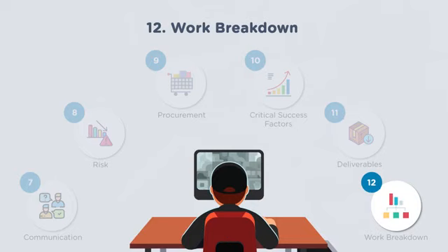I'm saying that a product will have multiple components involved. Those need to be segregated. For example, if I say car's exterior, car's interior. Car's exterior means external items you can see, whatever you visualize: body structure, mirror assembly, headlights, then tires. Likewise, whatever I can visualize, I will make it a line item under the exterior. For example, under a mirror I can speak about mirror glass, mirror cap, mirror pedestal, and mirror assembly, where you can move the mirror. So these are the various components involved in a mirror.